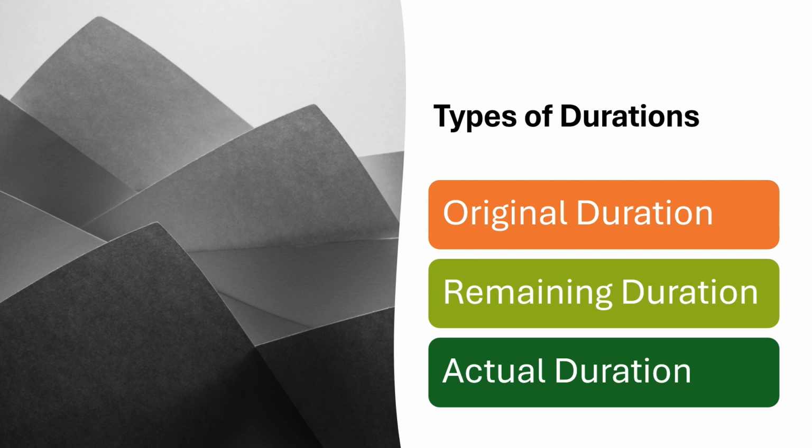So it takes 7 days. When it is excavated, the excavation takes 7 days. You assumed that it takes 5 days; this is called original duration. Then when the project is executed, it takes 7 days. So the 7 days we call actual duration, that is, how many days it actually takes to complete this activity.